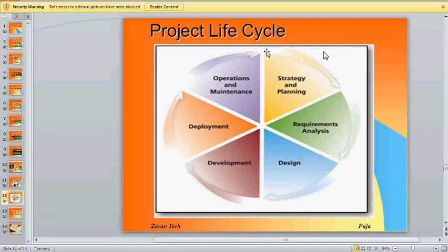Alright, so project life cycle is typically for non-IT projects. Project life cycle can apply to projects on a product level where we have IT and non-IT components. If that's the case, then the SDLC, the development, is where the split happens between software, or IT, and non-IT components, and they must be built separately. The IT component will require the SDLC. Okay, once all the components are built, it is integrated and becomes, again, you're testing on a product level.